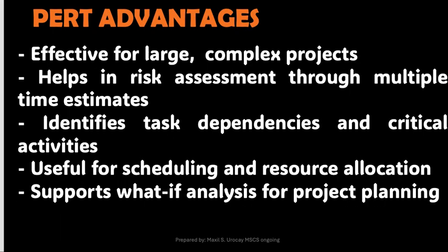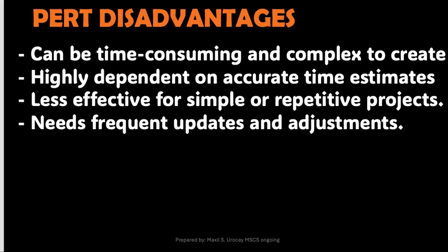The advantages are that it is effective for large, complex projects, helps in risk assessment through multiple time estimates, identifies task dependencies and critical activities, is useful for scheduling and resource allocation, and supports what-if analysis for project planning. The disadvantages are that it can be time-consuming and complex to create, is highly dependent on accurate time estimates, is less effective for simple or repetitive projects, and needs frequent updates and adjustment.